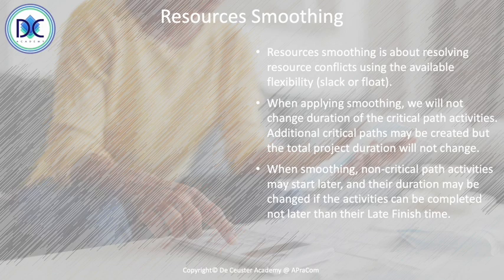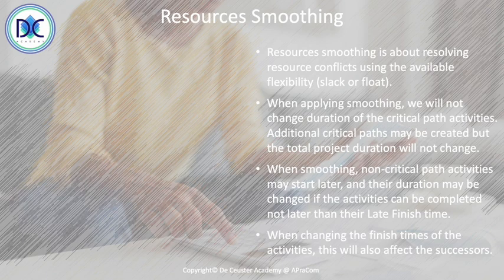When we look at smoothing and consider the non-critical path activities, they may start later, their duration may be changed, and the combination of the two, start later and change the duration, can also be completed. Everything is okay as long as we don't change the late finish times of the activities.